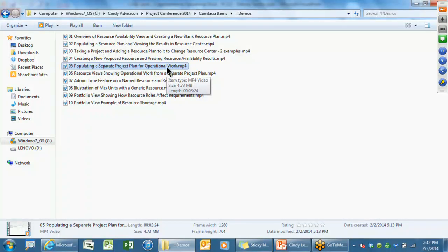Once you set the resource to one setting, that's its default. So you can't change committed or proposed back and forth. But what I have done, and I've tested this, you might want to experiment, is you could set up a resource as committed, assign them to a whole bunch of things, then go into the resource option, set them proposed, and anything future, they become proposed. That's a good workaround, and I actually just tested this week.